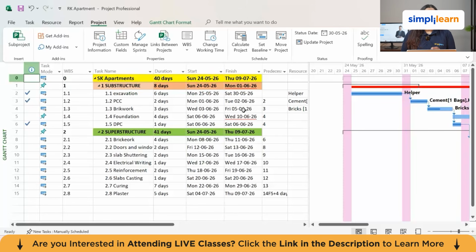The professional rule is to set a baseline at project authorization, when the contract is signed and the program is approved, and to protect it. Do not reset it because things are running late. A baseline that moves to match the actual program is not a baseline at all. It is a description of what has already happened, which is useless for management decisions.